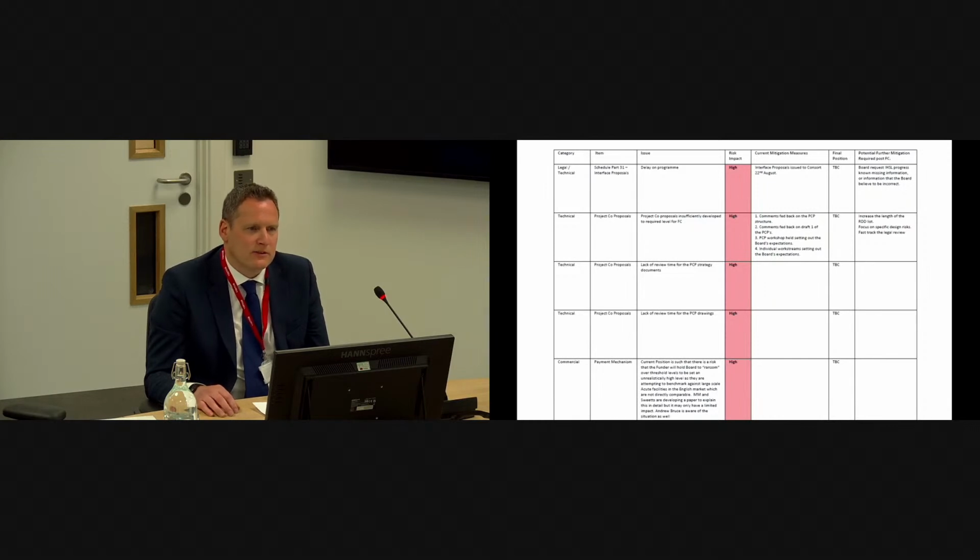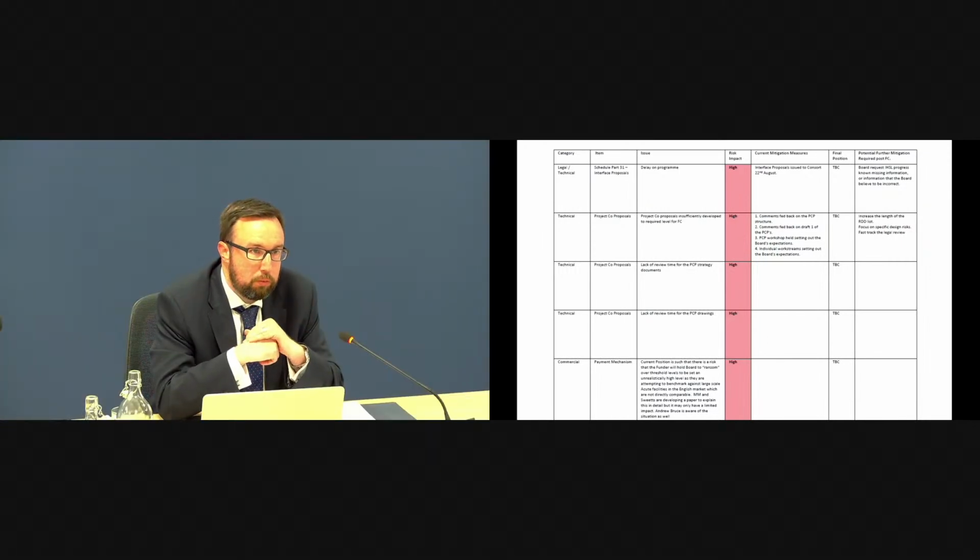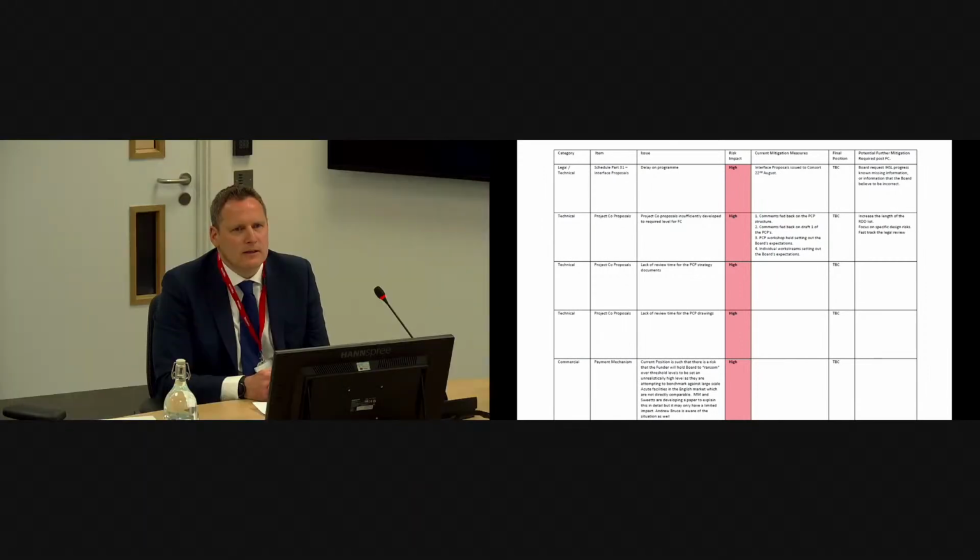measures with NHS Lothian in terms of if they still want to proceed to financial close, then rather than have open-ended project co-proposals, we're looking at mitigation measures to try and manage that risk. And is one of those to increase the volume of reviewable design data that would be in the contract? Yeah, it was more than just increase the volume. It was provide comments in addition to the overarching clause 12 obligations. There were additional comments that we wanted Project Co to address.